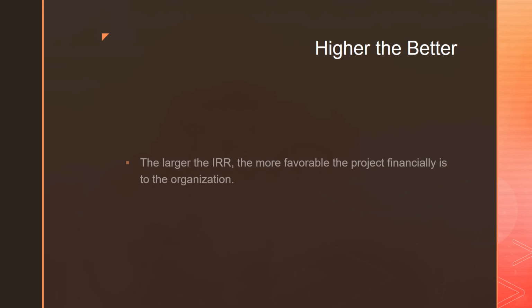But like I mentioned earlier, the higher the IRR, the better it is. The larger the IRR, the more favorable the project financially is to the organization. So the only thing that you need to remember here is the fact that the larger the IRR, the better that project is financially for the organization, and that is the project you as a project manager should be recommending to the higher management to take up.